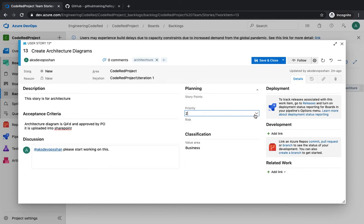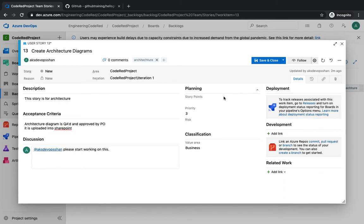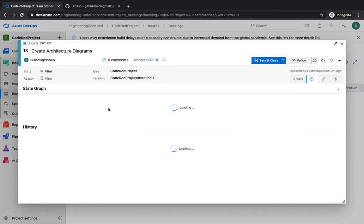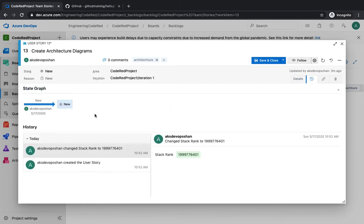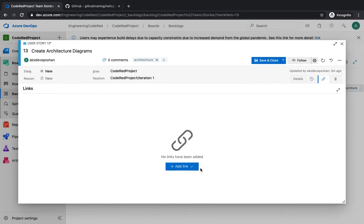You can also define story points and priority, which ranges from 1 to 4. Under story points you can define the sizing — whether it's t-shirt sizing, Fibonacci, or square root of even numbers — whatever methodology you decide. You can also see the history of what has been happening inside the story, and if you have an existing task attached to this user story, you can add it as well.